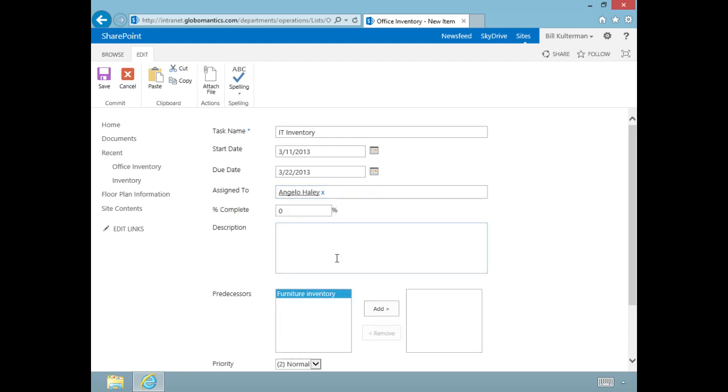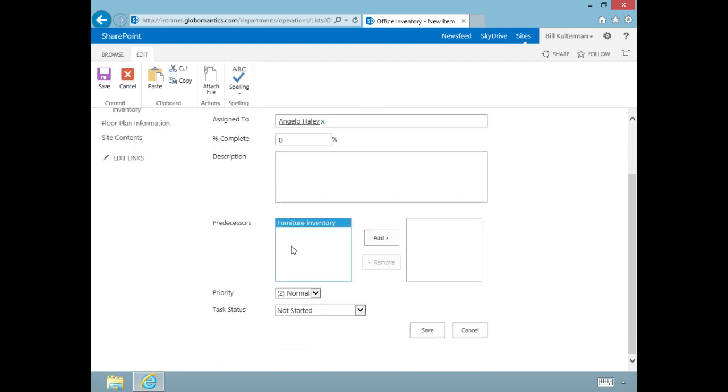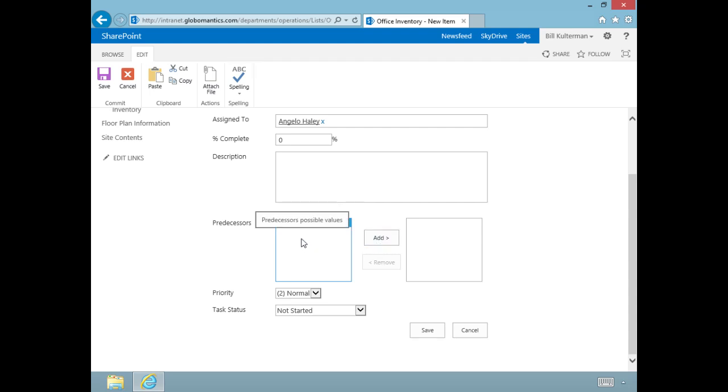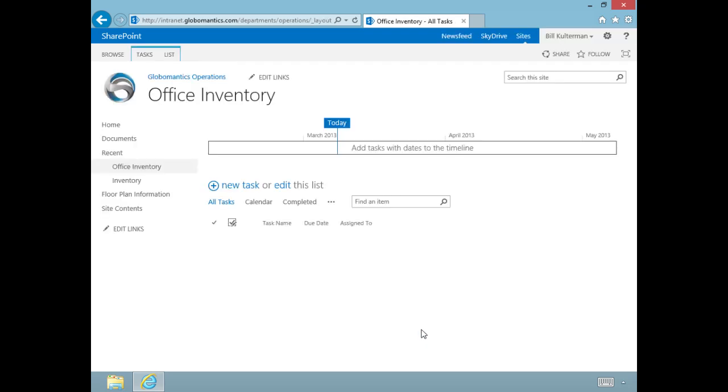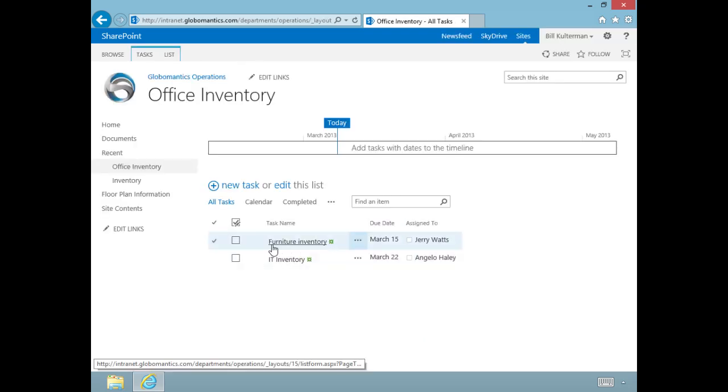I'm going to open show more again. There's that predecessor, the Furniture Inventory, but it's not necessary that the furniture inventory be completed before we start this one, so we're not going to add it. Angelo has not started this task, and we'll leave the priority and task status alone. We'll save that, and now we have task number two.